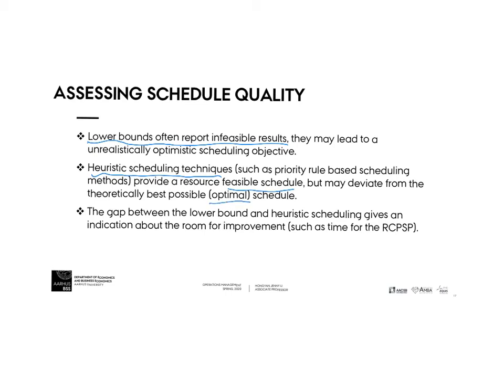The gap between the lower bound and the heuristic schedule gives an indication of the room to improve your heuristic solution.